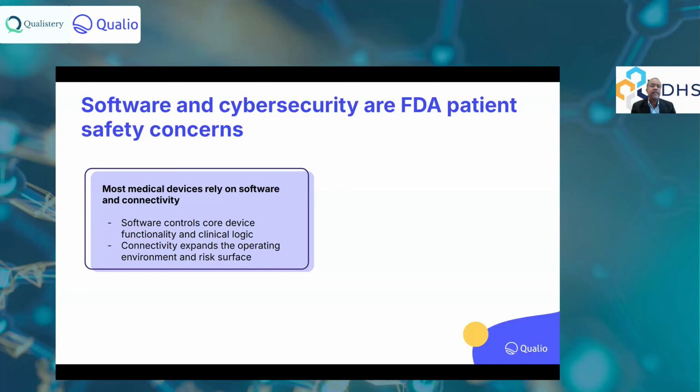Does it effectively store data and let you retrieve it? So that's your responsibility on SOUP analysis, part of risk management. And you have to do that under your software development activity. In that example, you don't have to validate everything that tool may do for you, just how you use that tool, right? So knowing what to do in software in context of risk analysis, when you think about it, is intuitive, but doing it is important. Documenting it is super important.